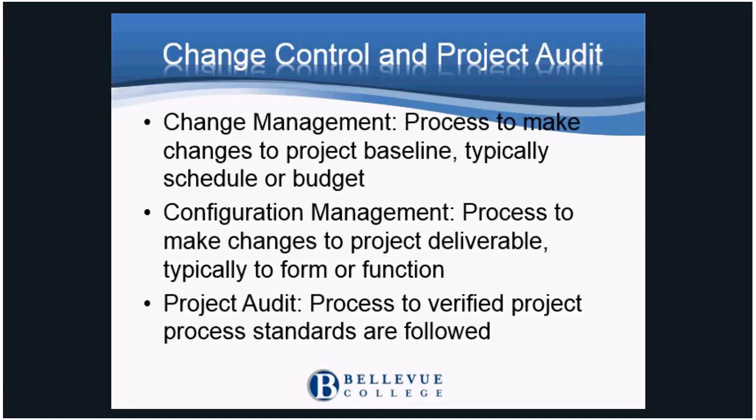When the project has completed the planning phase and is starting into execute, monitor, and control, if there's any changes to schedule, budget, or scope that will affect the outcome, they need to be documented and approved through the change control process. Configuration management is about how do we identify and track technical or engineering changes. Some examples include software version numbers or any sort of engineering changes that occur on airlines. Configuration management and version tracking need to be planned out before the execution phase.